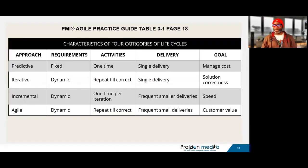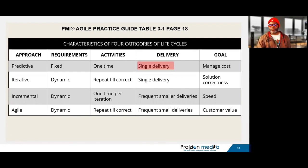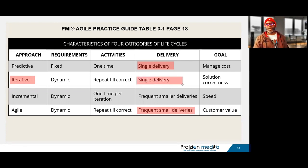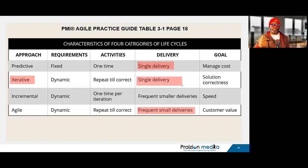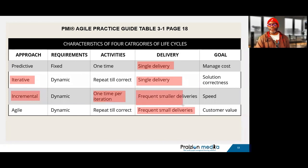Page 18 breaks down predictive, iterative, incremental, and Agile. In a predictive zone, you deliver one time — single delivery for predictive, frequent small deliveries in Agile. Iterative is also a single delivery, focused on repeating until correct with a lot of prototyping. Incremental does activities one time per iteration but has frequent smaller deliveries.